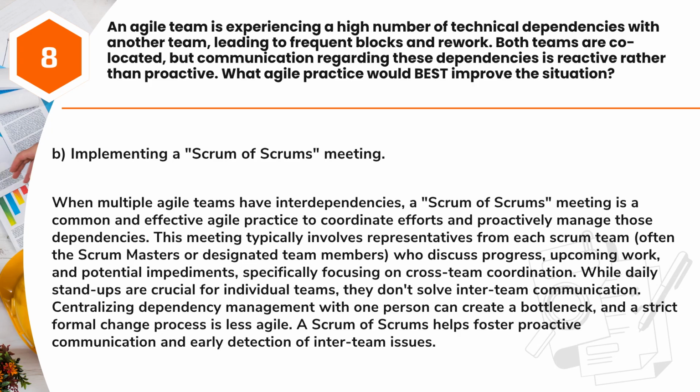While daily stand-ups are crucial for individual teams, they don't solve inter-team communication. Centralizing dependency management with one person can create a bottleneck, and a strict formal change process is less agile. A Scrum of Scrums helps foster proactive communication and early detection of inter-team issues.